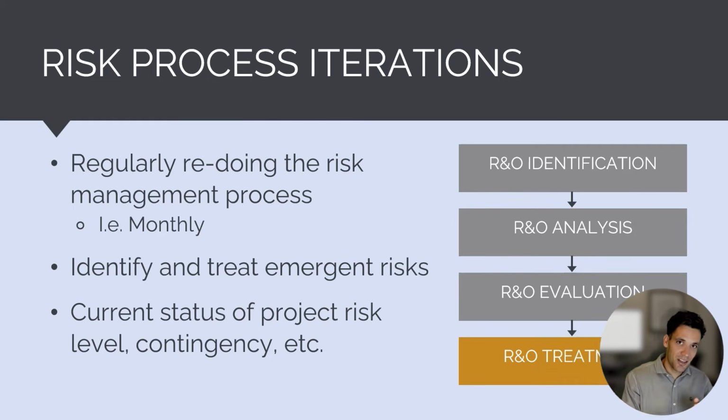Simplest way is to set a regular meeting in your calendar, whether it's weekly, fortnightly, or monthly, and identify and treat any emerging risks and look at the current status of our existing risks.